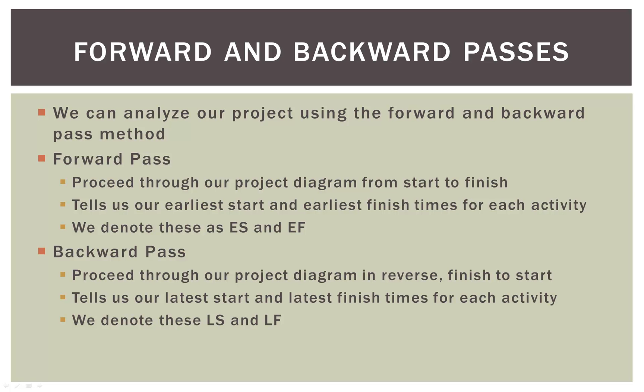So what exactly is a forward and backward pass? The forward pass means we proceed through our project diagram from start to finish — it tells us our earliest start and earliest finish times for each activity, denoted ES and EF. The backward pass is the exact opposite: we start at the end of our project and go backward to the beginning, which allows us to find the latest start and latest finish times for each activity, denoted LS and LF. Those tell us the threshold of when an activity can end without delaying our entire project.